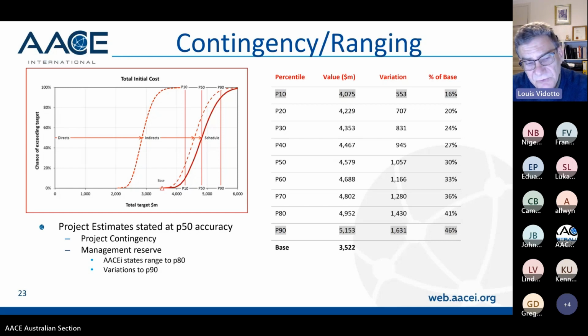Some companies are also now going to a combined approach. For example, BHP, when we do a fair bit of estimating with them, they talk about an estimate and schedule development plan as one document, and also they're starting to go towards an estimate and schedule basis. Because they are linked, and a lot of the stuff in those bases are common.